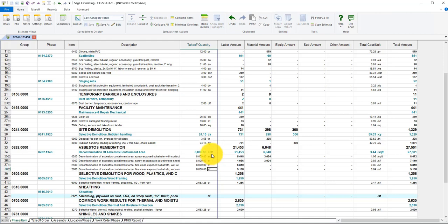Sometimes you want it to count all the eaches here. You just put in each, and it'll total them all up for us. And sometimes you just want one of these in the overline. So one method is to change the unit so that you have a matching. And it's case sensitive. So if you went EA, for instance, here, and went EA here, then you'd only pick up the 35. We'll go back, look at that one more time.